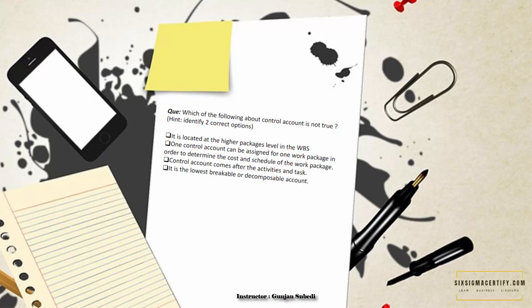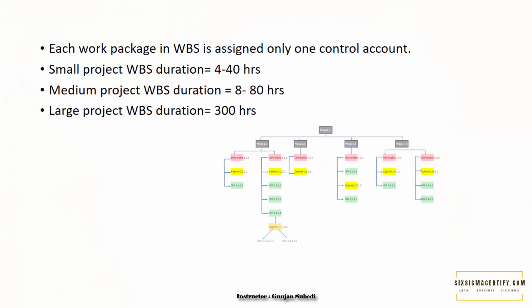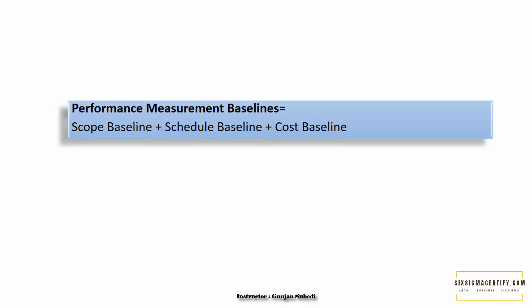Activities and tasks come from breaking down work packages. Depending on the type, duration, and complexity of projects, we may have different kinds of work packages. For small projects, WBS work packages generally have a duration of 4 to 40 hours. For medium projects, it is 8 to 80 hours. For large projects, WBS work package duration is around 300 hours.